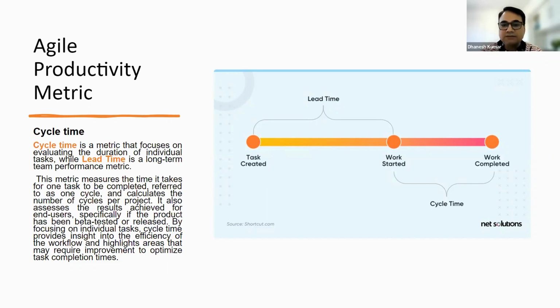Your lead time would be a combination of wait times, which in lean words is basically the wastage or bottlenecks that are happening, and your working time, which is your cycle time once we actually start working on it. And this directly impacts your value metric, time to market. The better your process of delivering things is, the better it becomes for your value metric of time to market.